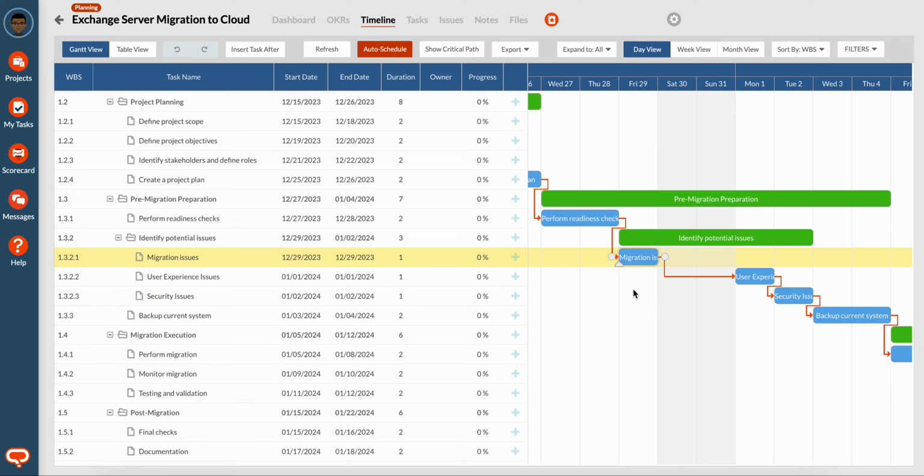And so we don't really want to have each of these tasks be 1 day long in sequence, creating 3 days. Rather, we'd have 3 days available to 3 different people to work on each of these tasks and finish at the same time.